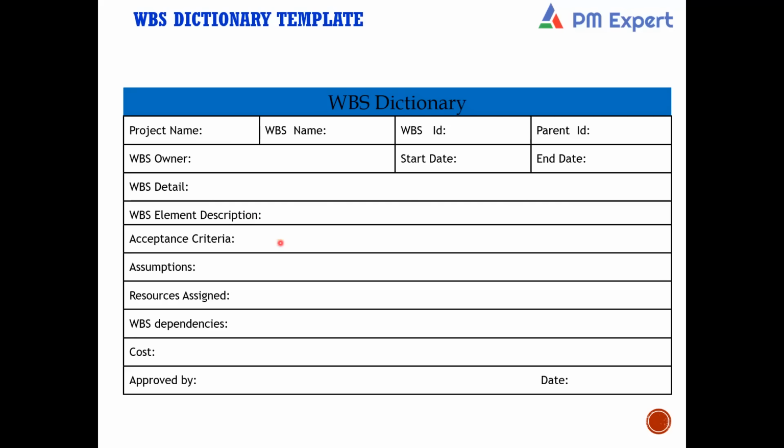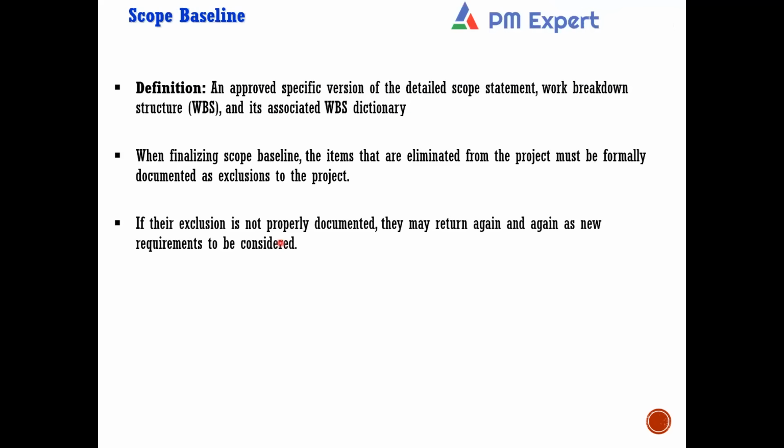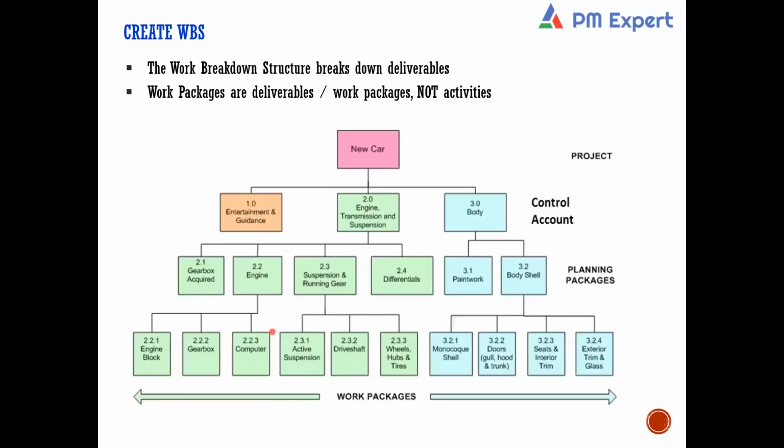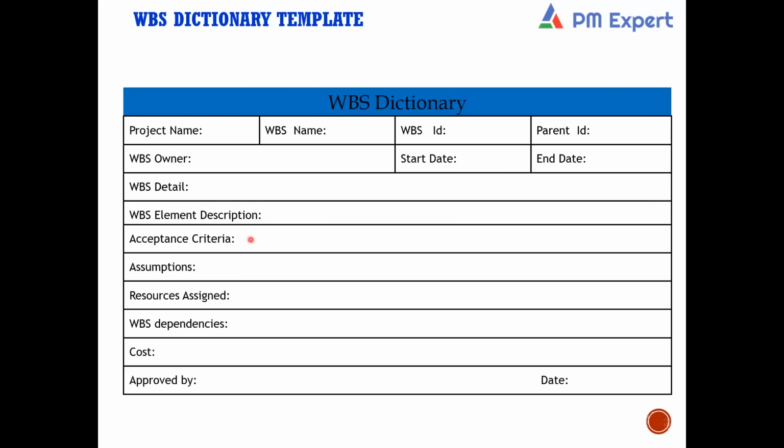Now, for the customer, it's a dictionary. But for the supplier, is it not a statement of work, for their project? Yes. For example, Infosys is doing a component, let's say an AI component. This component will also have a WBS dictionary like this. The customer might maintain it as a WBS dictionary, but for the supplier, is it not a scope, a statement of work, SOW? Yes.